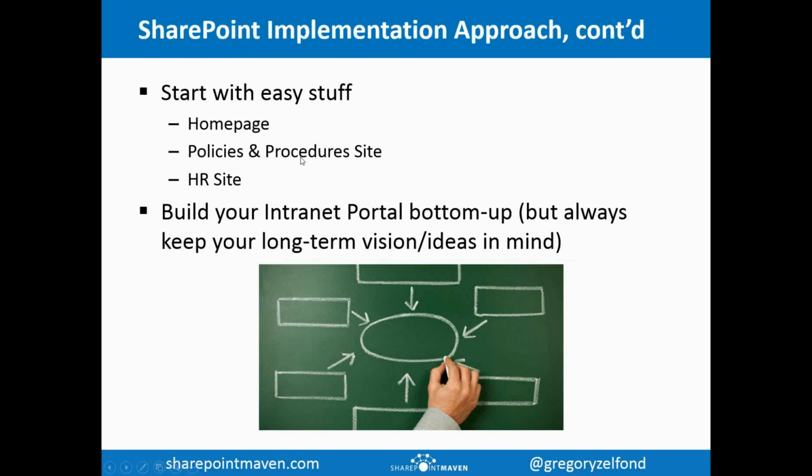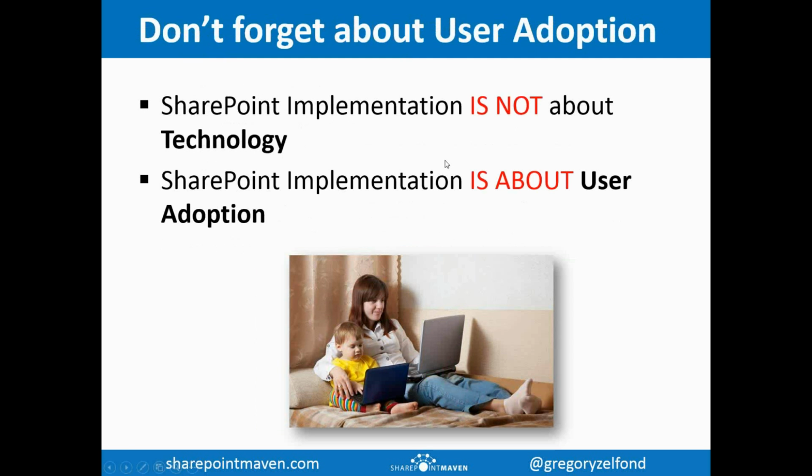But once again, this is very critical. You should never, ever roll out 15 or 20 sites at once, simply because you will not be able to concentrate on the individual requirements. You will be stretched thin, and your users will be stretched thin. So you definitely want to implement in smaller increments. I call this an intranet bottom-up approach. Once again, keep your long-term vision in mind, but start small. Okay, hopefully that makes sense.